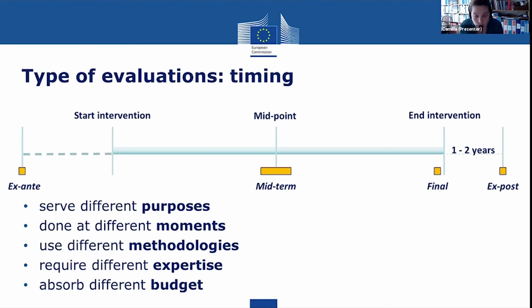Now, if you have to launch a phase 2 of a project and you carry out a final evaluation, the results of that evaluation will come in too late. And so if you plan to use those findings to inform the future programming process, you will find that there is a big gap of time. So if you do want to have lessons learned, know where you're going in order to inform a second phase or a similar project, then a midterm is what you will be looking for.